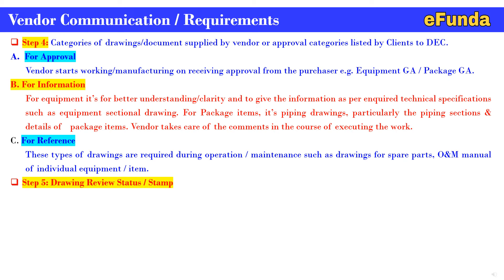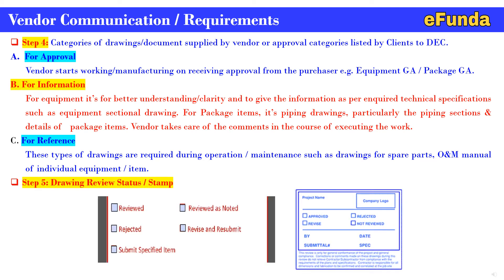Step 5 covers drawing review status and stamps. Once documents from the above categories are reviewed, one must ensure that the complete review cycle information and status are marked on the vendor document. Two types of stamps are typically shown: the first type includes reviewed, reviewed as noted, rejected, revised and resubmitted, and submit specified item; the second type includes approved, rejected, revised, and not received. These stamps are organization-specific, and one should refer to their organization's specific stamps and structure. This is how vendor communication and requirements are carried out as part of vendor document engineering review.